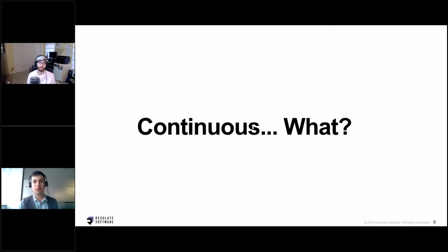It's basically about doing things in a continuous way, improving your work in a continuous way. It's far different from the way that most software companies used to work and think, with the traditional waterfall methodology, where they spend some time to plan, spend some time to gather requirements, spend some time to actually work it out, test it, and then at the end, when they start delivering it, it's not always the thing that the customer expected. And this is costly. I mean, this is a problem. That's why people started thinking, how can we fix that?